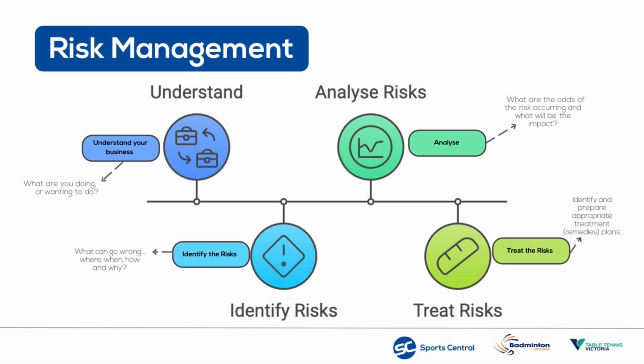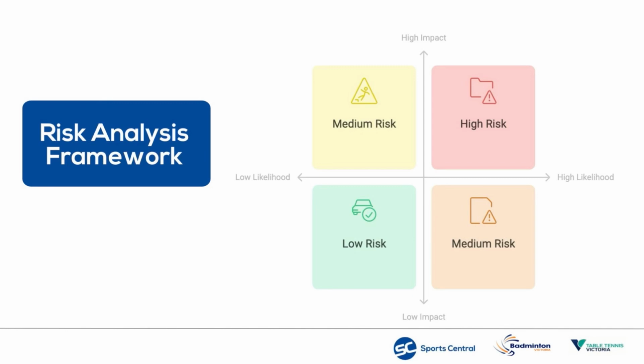This is a really good table that can be used to help identify what the high risk areas are, what the likelihood of it happening is, and what the impact of it happening is, and then grading every risk factor that's been identified as either a high, medium or low risk based on that. It's a really good, simple way of being able to identify and prioritise, and we like to apply something like this across a lot of our planning work to identify what's going to have the biggest impact, negative or positive, so we can prioritise it.